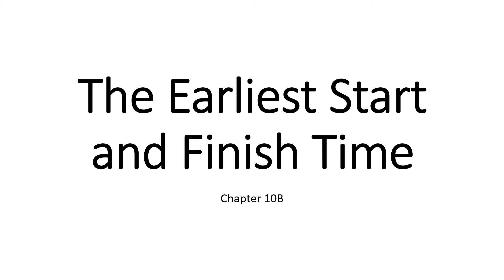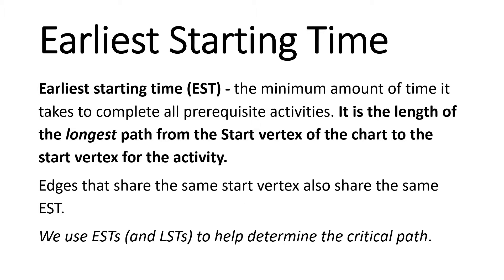Chapter 10b: Earliest Starting Time. The earliest starting time is the minimum amount of time it takes to complete all prerequisite activities. It is the length of the longest path from the start vertex of the chart to the start vertex of the activity. Edges that share the same start vertex also share the same earliest starting time.